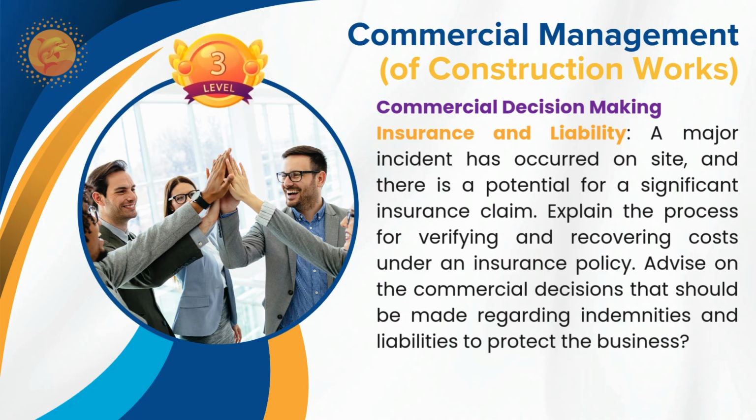For that, I enclosed the work approved status, material purchase orders, the resources required to recover these damages, and all relevant records. I have kept daily records, and accordingly I prepared the insurance claim and submitted it to the insurance company to recover the losses.